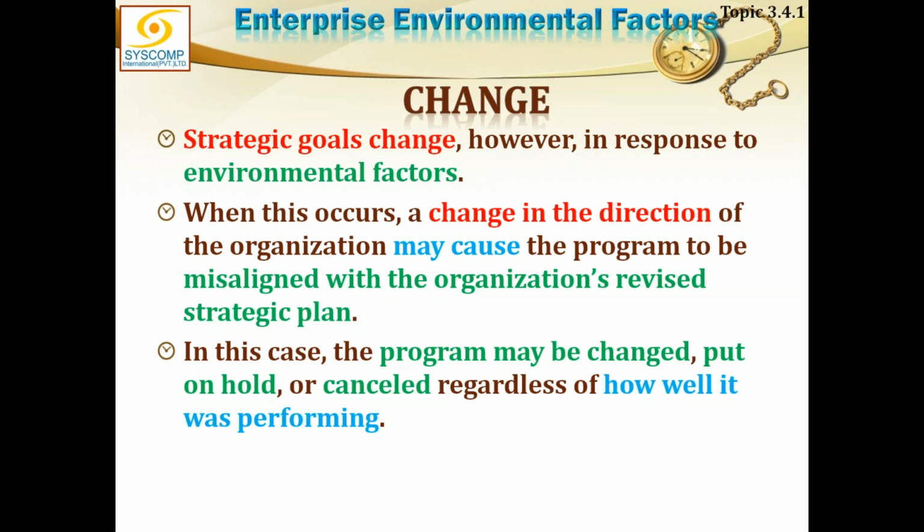When this occurs, a change in the direction of the organization may cause the programs to be misaligned with the organization's revised strategic plan. The new strategic plan they will create would not be in alignment with whatever you have designed your program to be. Therefore, you have to realign your program to the new strategy. And if by doing that you understand that your program has lost some of its weight, it is no more valid, or it has gone down in priority due to the changed strategy, then your program may go on hold, or may even cease to exist.